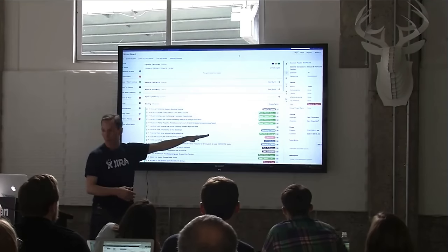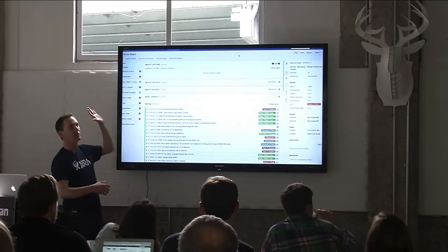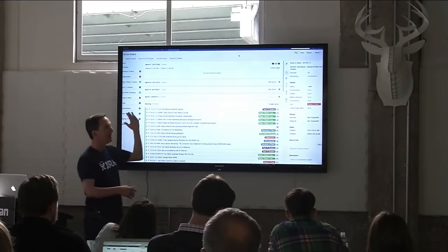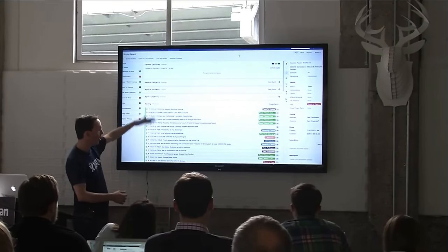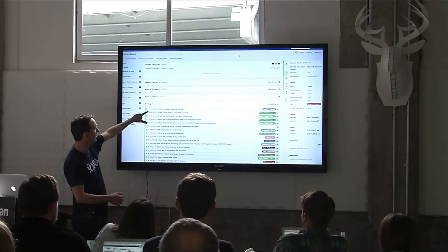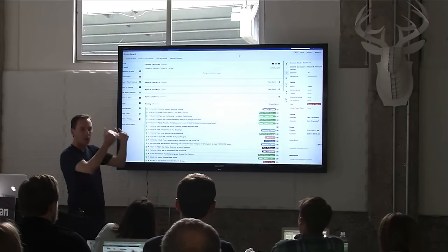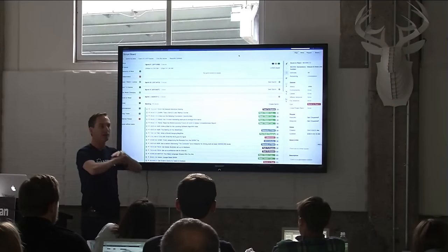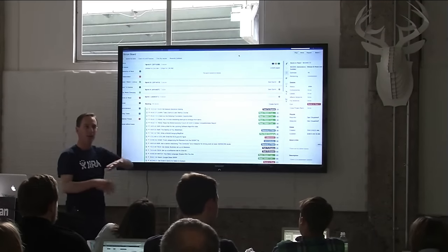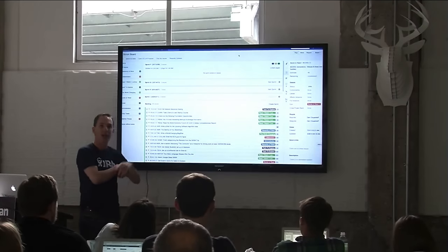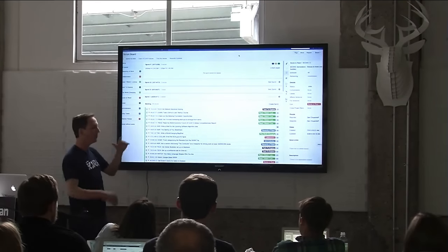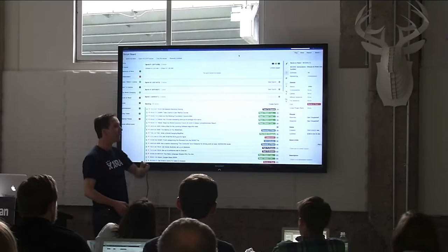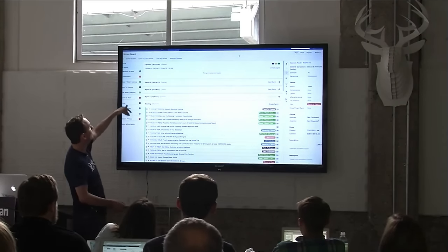This is the plan mode of a Scrum project — my home instance. Initially you start creating issues and end up with a bunch of stuff in a backlog. You create a list of all the things your team wants to do — it doesn't have to be stuff for now, it can be stuff you're not going to do for two years. You create all those tickets and they end up in the backlog. The second thing you need to do is figure out if you want to use epics.